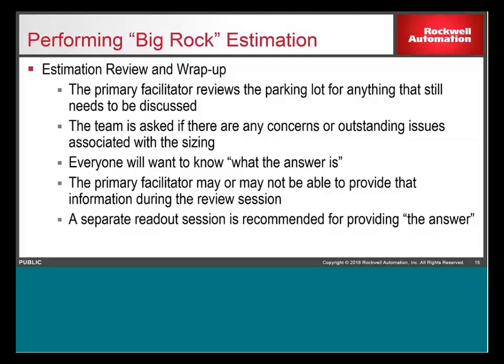All right, so estimation, review, and wrap up. When you get to the end of the estimation session, you should review the parking lot for any open items that need to be discussed. If there's some follow-on work or some homework that needs to be performed, or if another session needs to be scheduled, talk about it and make sure that gets covered. If there are any other concerns or outstanding issues, again, work through that.